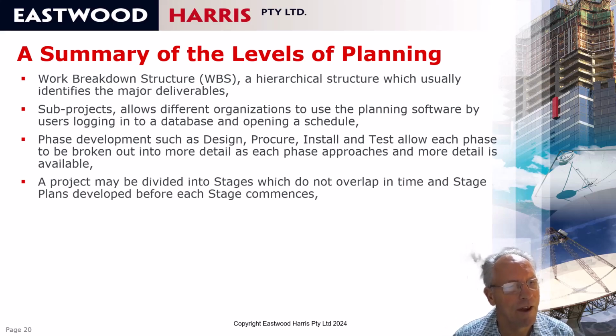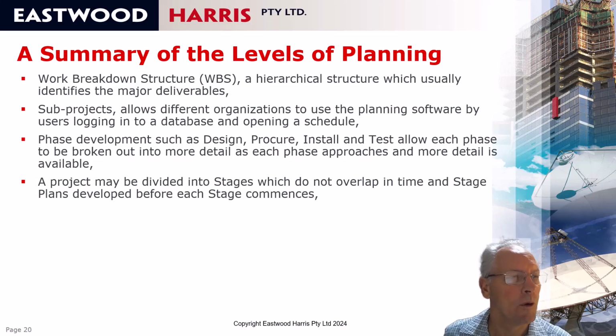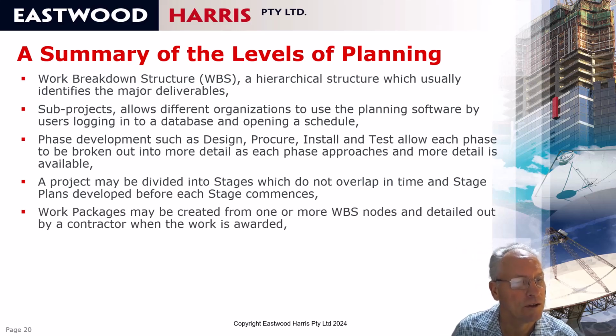My definition of a stage is that stages don't overlap and phases do. It's important that you define your terminology as part of your project documentation so people are clear what you mean, because some people have slightly different definitions for terminology. It's important that your project team understand what you define as a phase and a stage. If you use the stage term, where stage 1 is finished and then stage 2 starts, generally you would do the stage 1 program before you start stage 1 and the stage 2 program before you start stage 2.